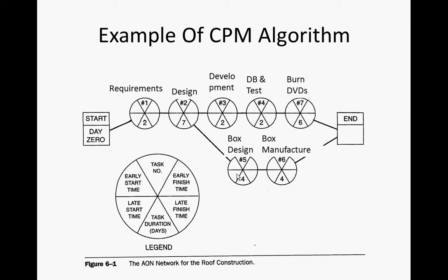This is 17, what is this? 23, okay, good. Okay, now, we have the earliest possible time we could finish this project is time 23. If we had adhered to this representation, there would have been an earliest possible time we could have started this that would then become the late start as well. The latest we could start it before finishing, and that's 23. So we're going to use that.